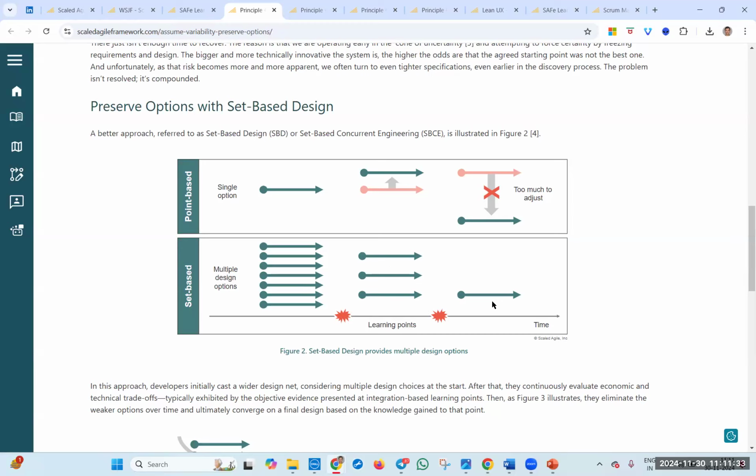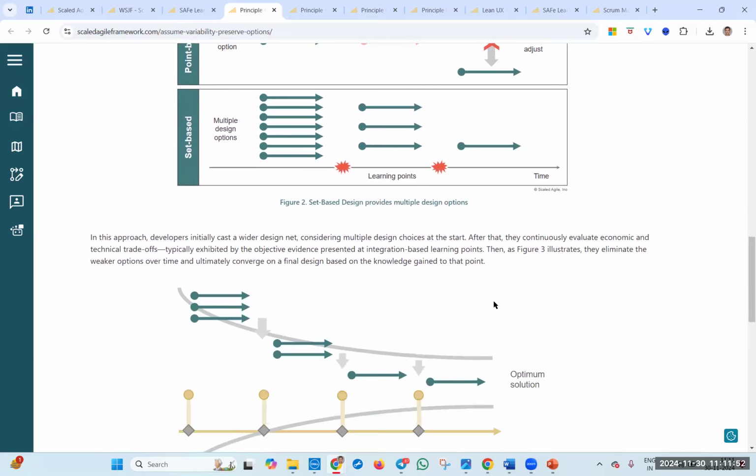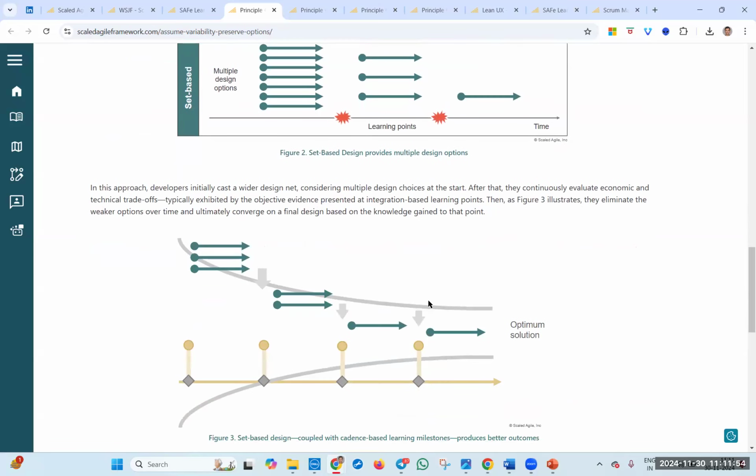Maybe we can do a small POC and experiment how it goes with the different combinations, permutations, and then we might go with one of the options. Then even if we get stuck at some point of time, we have the handy options, the other options which you already evaluated and kept ready. So at some point of time, if required, we can go back and pick up the next option or the next solution, and we can go ahead with the implementation.